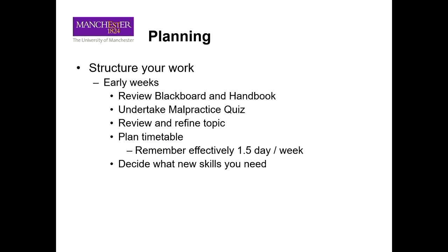So you've got to be careful of things like the skills you need. If you've got a modeling project, and you need to learn the language, you don't know how to program or to model in this software, it takes time to learn how to program, okay? How to model on ANSYS or on Abaqus and so on, okay? So you need to allow time, okay?